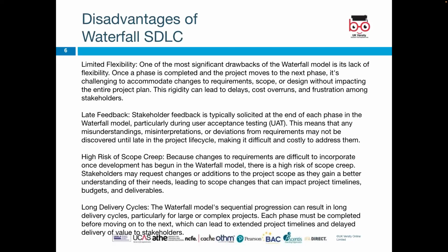Long delivery cycles. The waterfall model's sequential progression can result in long delivery cycles, particularly for large, complex projects. Each phase must be completed before moving to the next, which can lead to extended project timelines and delayed delivery of value to stakeholders.